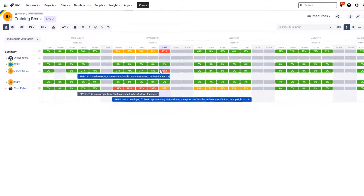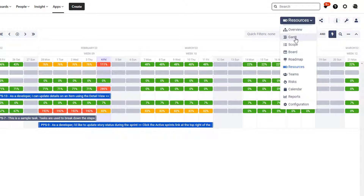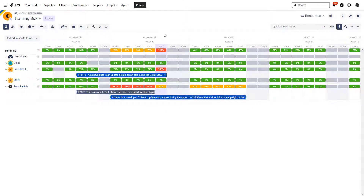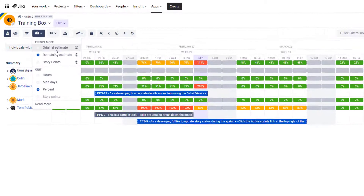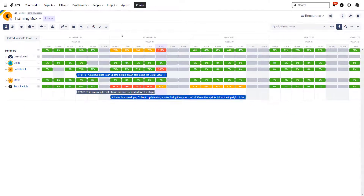Personally, if I were working the waterfall way, I would prefer to look at progress in the Gantt view. But the resources view is also informative. I usually recommend that during planning, working with the original estimate effort mode is absolutely fine. But when the project is already in progress and you want to follow that progress, it's better to switch to remaining estimate because you'll get more meaningful data. That of course depends on how you are working with your project data and resources.